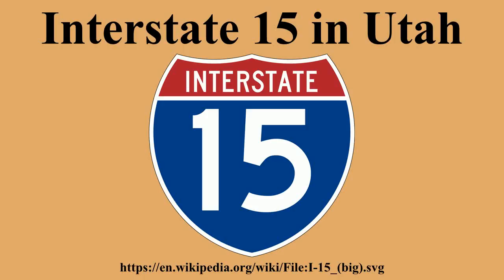The UDOT Utah County I-15 corridor expansion was a design-build project that reconstructed 24 miles of I-15 in Utah County, Utah. The $1.725 billion project was the fastest billion-dollar public highway project ever completed in the United States. The project was completed on December 15, 2012, 35 months from the original notice to proceed, and finished $260 million under budget.